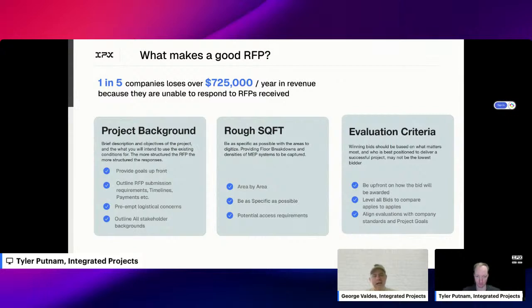What's the actual scope? So even if it were, say, a hospital, right? Getting more context that it's not the entire building, that it's a certain floor, getting down to the level of square footage, right? Like how many square feet? Because interestingly enough, a lot of the logistics around how one actually starts to scan these locations is more at a square foot level, and so there's a relationship between square footage, the amount of area one has to cover, the amount of area one has to scan, and time, right?